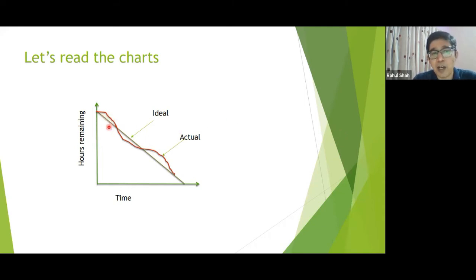So what do you think? We also need to identify why this is going down. There will be some variation, around plus or minus 10%, and that should be fine, because somebody might go on emergency leave, or they are working on some pressing issue and there is no solution yet. That's why it is going up.